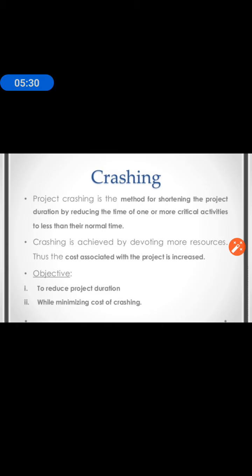The objective is to reduce the overall project duration while minimizing the cost of crashing. In one project or network, you can find various crashing stages — first stage crashing, second stage crashing, third stage crashing. At each stage, you calculate the project duration and project cost. We compare the duration and cost across all stages, and finally decide at which stage to carry out the crashing of the network.